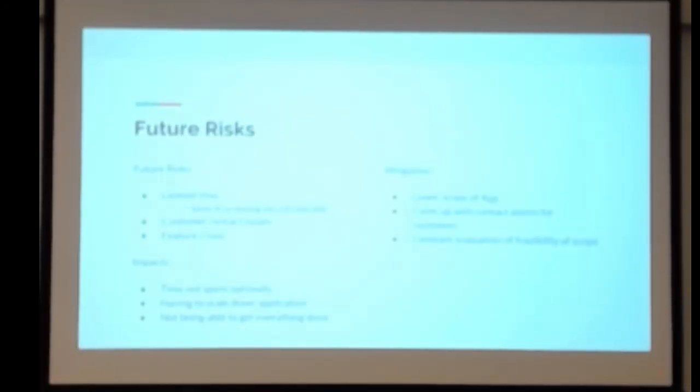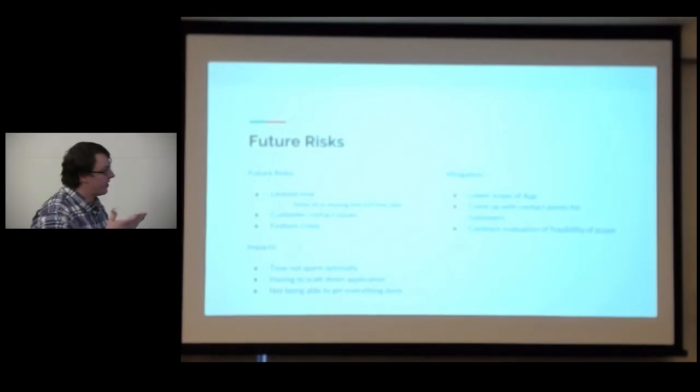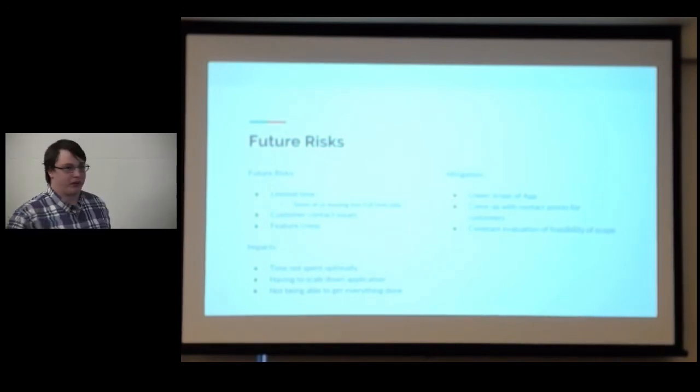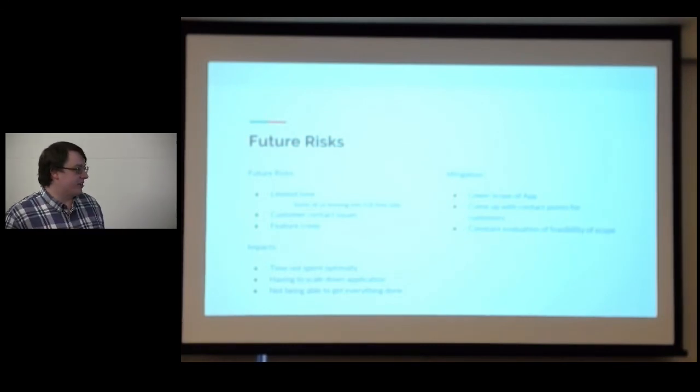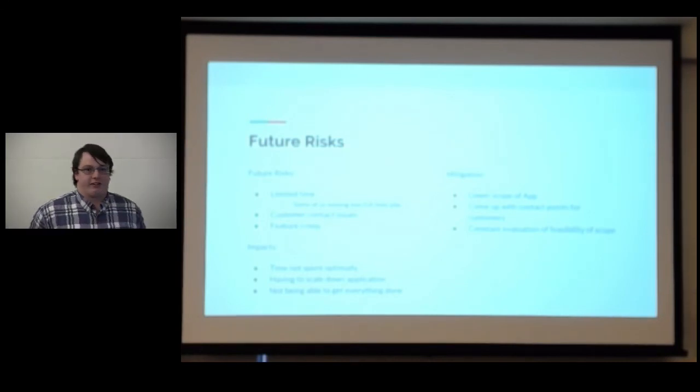So, some future risks: limited time. Some of us are moving into full-time jobs as we're finishing up the senior project of the summer. The university contact issues, and we had to deal with feature creep since the requirements were not originally formally defined. Impacts of this could be time not being spent optimally, having to scale down the application, or not being able to get everything done.